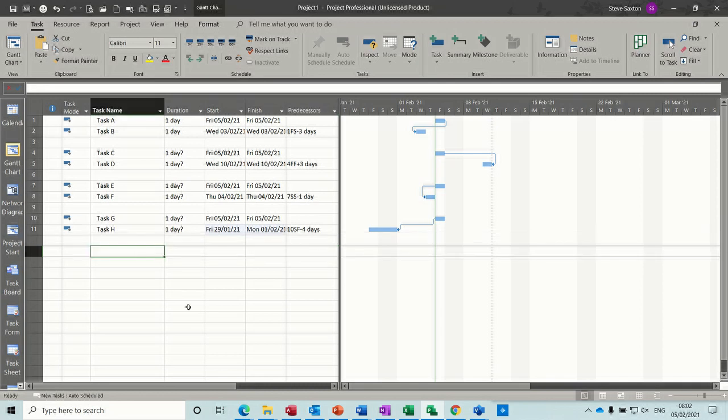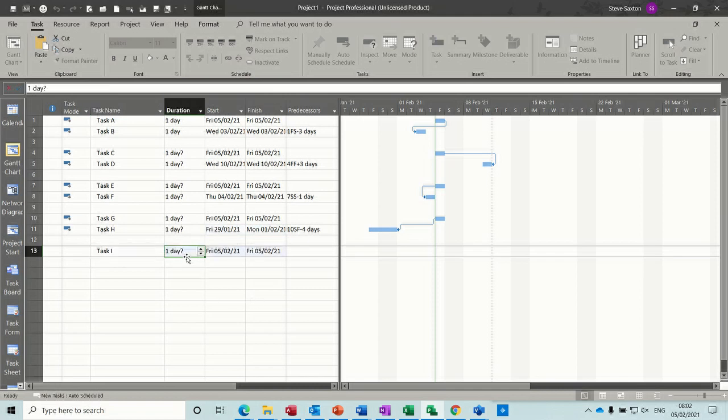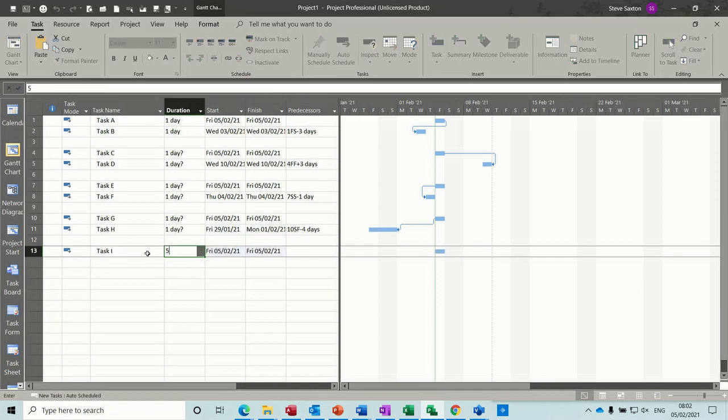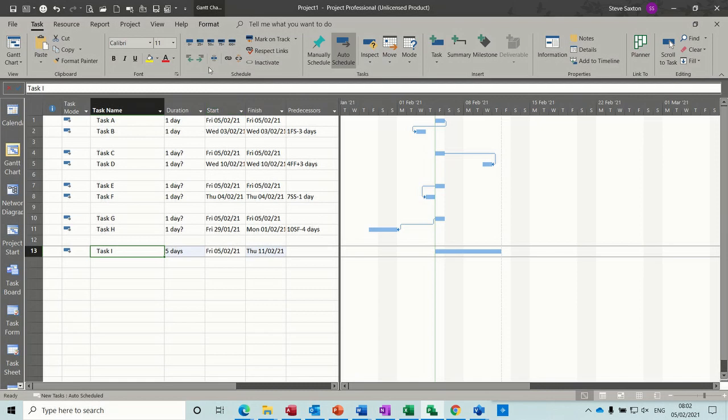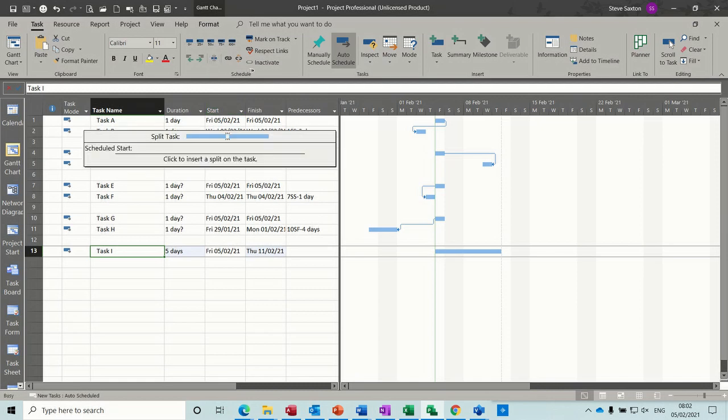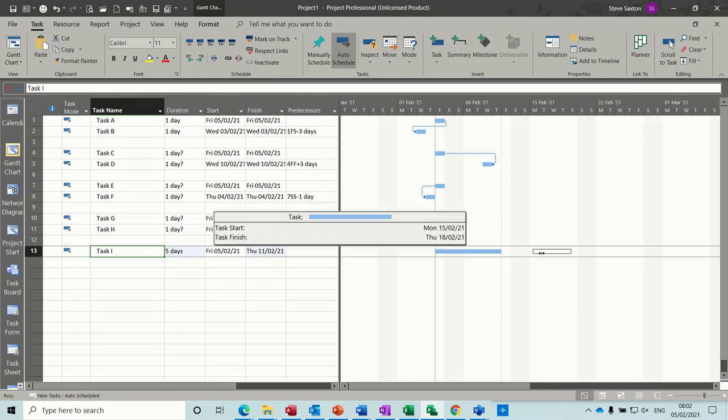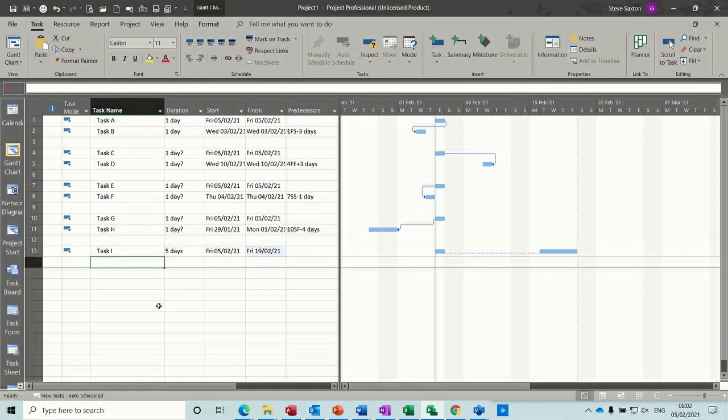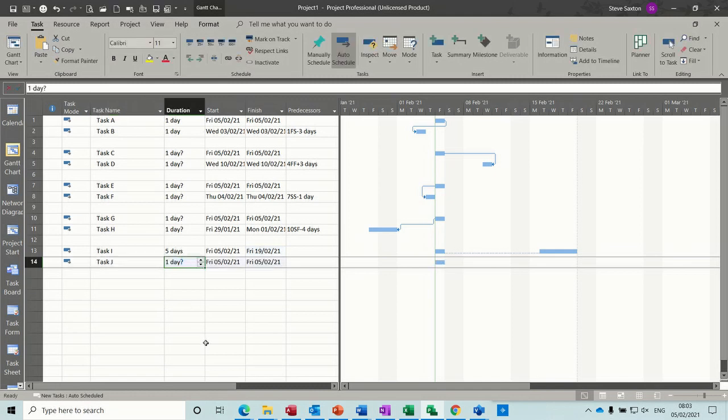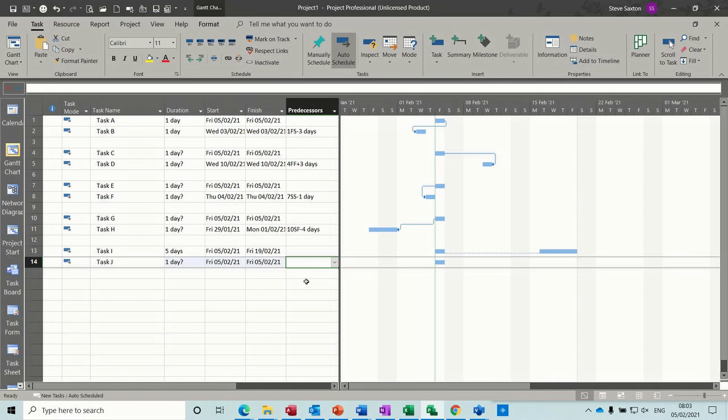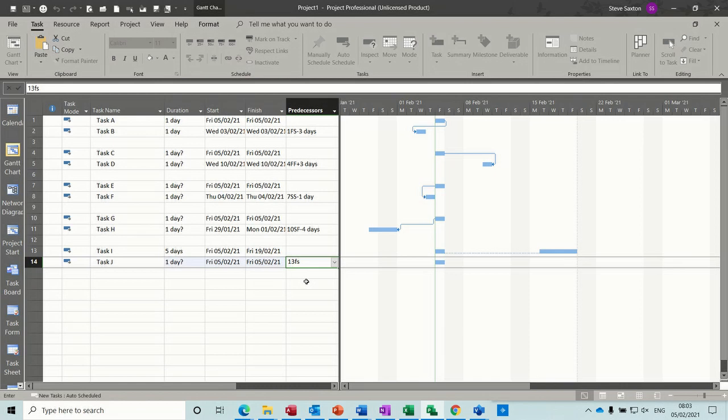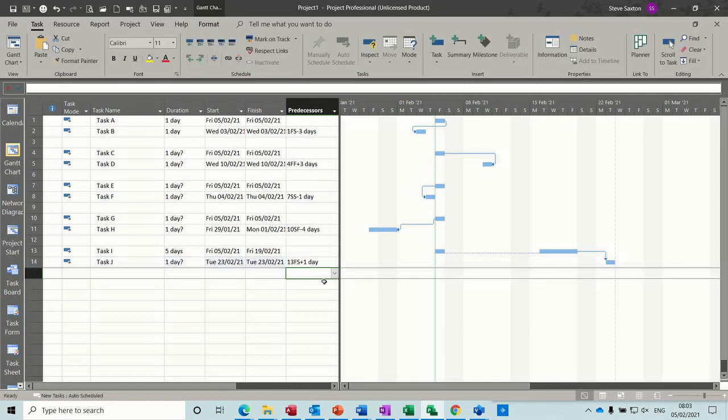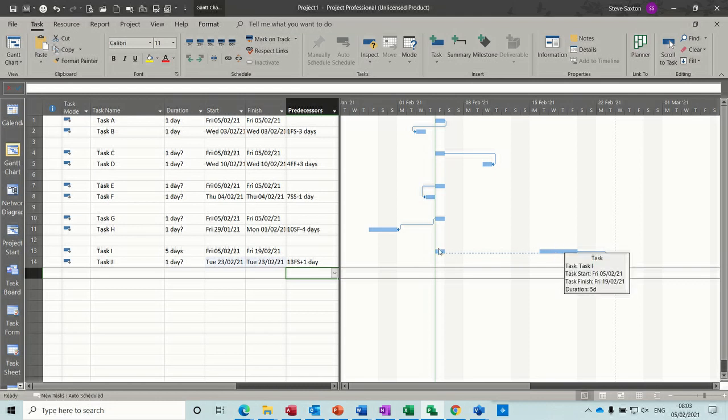And the last one, if I just do one more. Let's do a 5 day task. Now if I split this task, just grab the split tool and just push it into next week. And then link a task to that, so if I go, 13FS plus 1. So it links to this part of the task, not this part of the task.